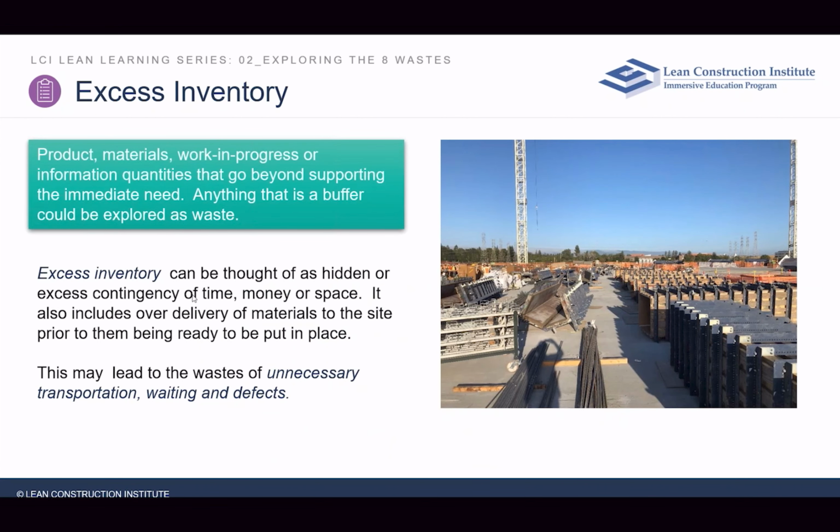So excess inventory, it really ties into the idea of motion. Excess inventory on our project sites is a huge issue. How many people have been to a project site where we have all of the framing up in the entire space, all the metal studs are up in the whole job site, and we have areas where the studs have been pushed apart and flattened because people walk across them, because that's their path, the least resistant path of travel?